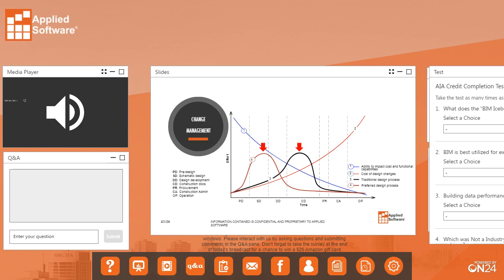As the project goes towards CA, any changes will have little effect because, if you think about it, let's say we were talking about the pour of a slab. If you're making those changes on your construction documents or models at the very beginning, you can have a huge impact without increasing the cost. And if you do it towards the very end, you have a high increase.